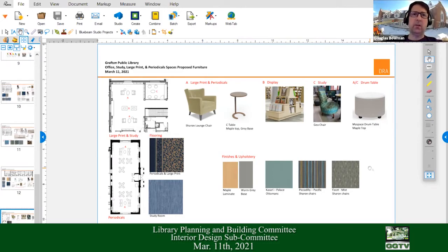Well, we can't go over our bonded value for the total project cost, right? We can't go over that. So if we vote to approve to spend a little bit more on furniture, on this piece, isn't that going to impact something else? It absolutely will if there's no additional funding from outside sources. So I guess that's what I'm asking. If there are donors or the friends or whoever is ready to commit X amount of dollars to this specific item or not, we have to figure out how much money we have and if there's a hard ceiling, then we design to that. Yep. And I think from the capital campaign's perspective, we need to figure that out early next week.